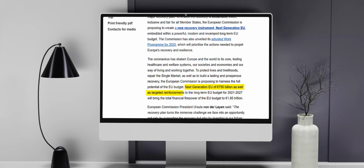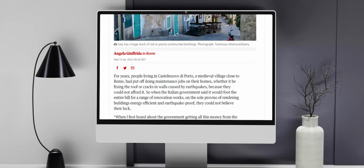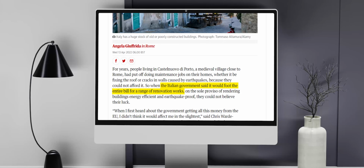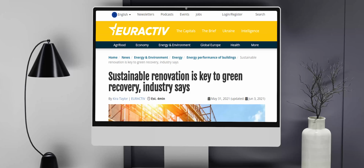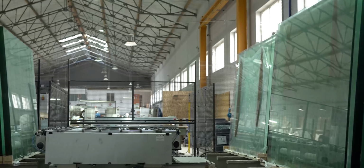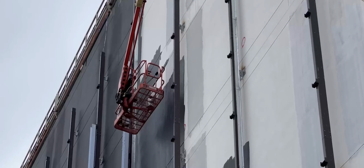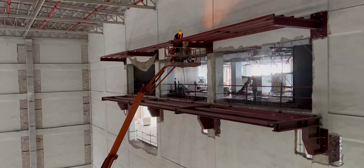At that time, the European Union ended up with a very generous program of about $1 trillion, or euros, to subsidize renovation of buildings in Europe. And it was up to 110% of costs. And whenever bureaucrats decide on a program like this, it was very clear that before long, all the construction materials are going to go way up in price. And so we had to make sure with our early contracts that we locked in almost all of the steel, almost all of the aluminium, the glass, much of the stone, before we had that run up in prices. And so we avoided paying a premium that a lot of people had to do by locking in these things early. And so as we were navigating all of these challenges, it was sort of a matter of locking in and learning and optimizing these factors.